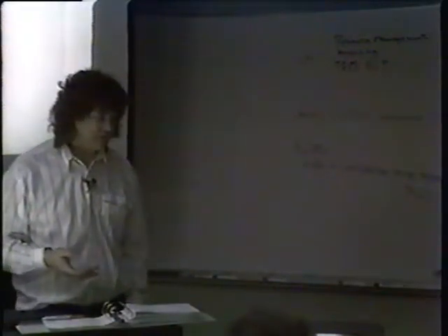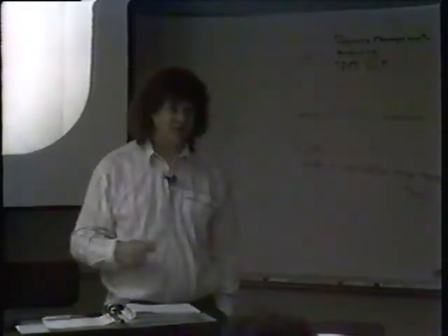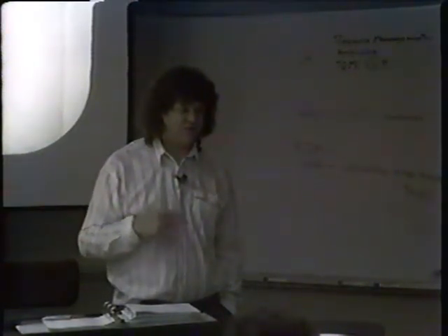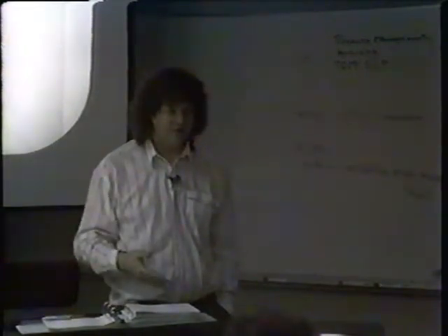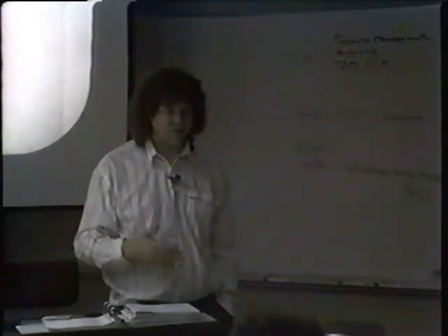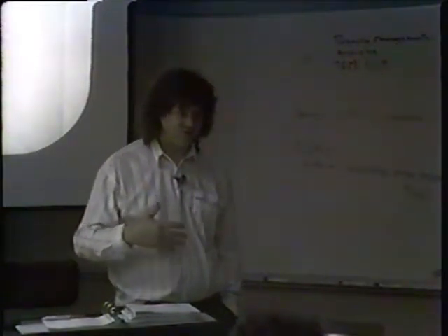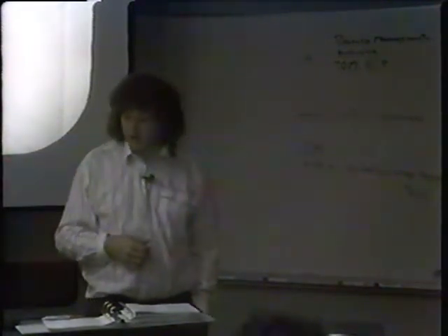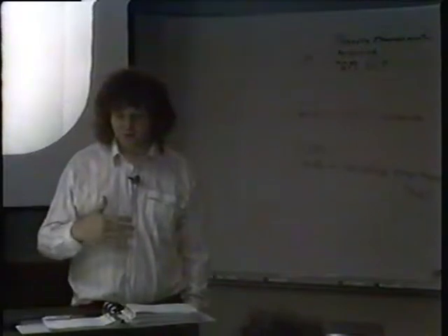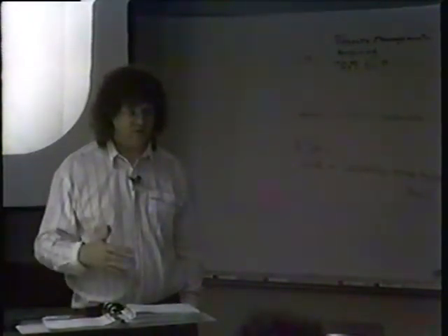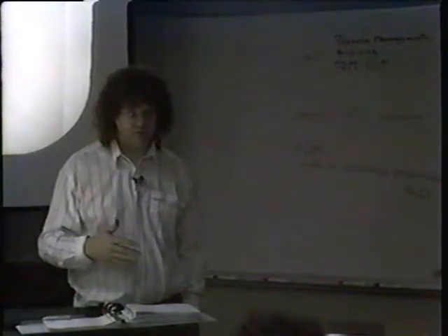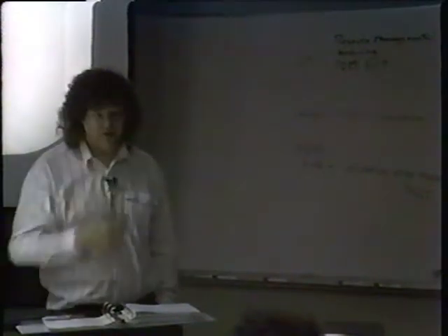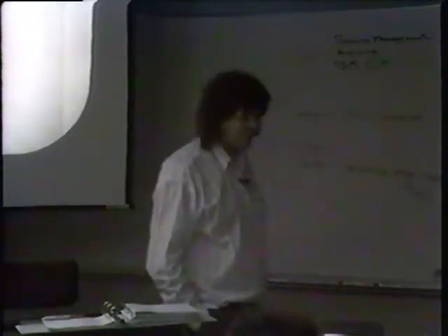And finally, training the user community. That's where you now have UNICOS service available to your user community, and you have to train them on it. You really don't want to put users on the system until the system's ready, everybody's ready. You don't want to teach them before the system comes in because they're not going to be able to apply it. You don't want to do it during the installation process because you want to control the workload and you want to control the way you're opening the system up to the user community. You want to really do it once things are satisfied or stable and squeaked to something that is feasible for that user community to use.